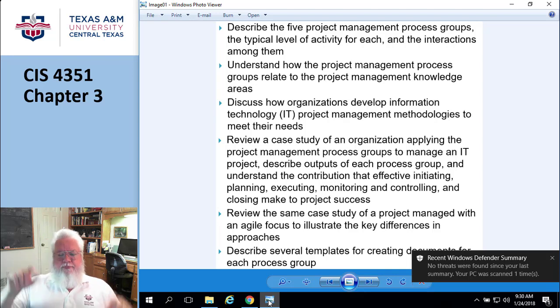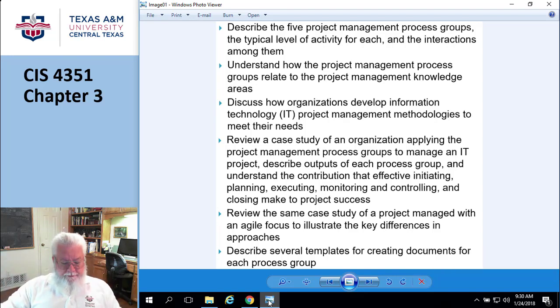Now, these 5 process management groups need to be kind of mixed with all the steps you're going to be taking during the process. So, essentially what happens is a miniature version of these 5 things happens practically at all steps, all phases of a project. So in a particular phase of a project, you're going to be doing some planning, some execution, some monitoring. Then you go to the next phase, it'll be another initiating, planning, and so these things, maybe not all the time, but these things occur at practically all phases of a project.